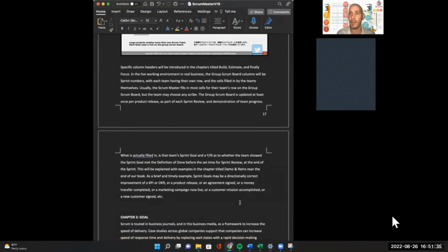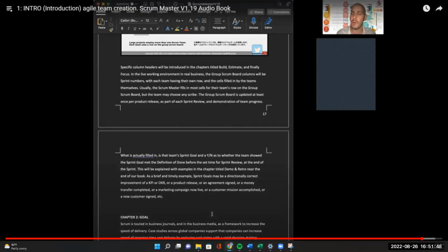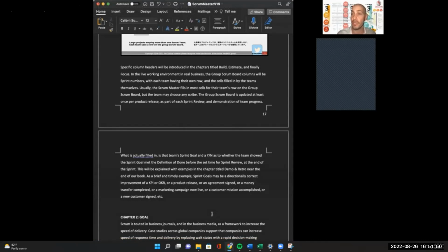This book is going to show you how, if you haven't learned it already. Maybe you've already taken a class with me and you're just reading this book for review. But here are sprint goals that you can use to get started. You have a KPI or OKR, like defects found in field. A sprint goal could be to reduce that. So what's something you can finish in less than a month that will reduce the number of defects found in field? Cool, right? That's a KPI or OKR that's really valuable to the business.